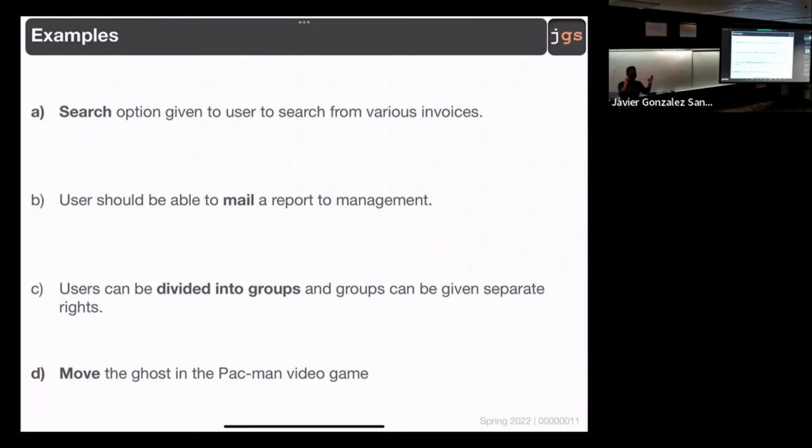If you read that, question number 1: is it a requirement? Yes, no, but in order to select one or the other, INVEST. Independent, negotiable, valuable, estimable, testable, and small.